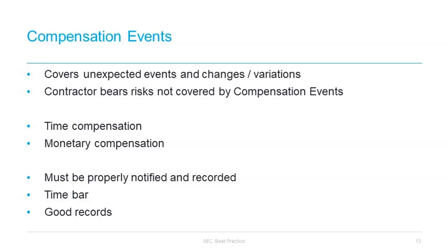Clause 65.1 intends that a compensation event is not implemented until a quotation is accepted or the project manager notifies his assessment. However, in practice, implementation often happens concurrently with or even before the assessment. In our experience, contrary to the position intended by the drafters, compensation events are frequently assessed on a retrospective basis because, for example, the contractor needs to progress the additional instructed work without delay rather than wait for the notification, quotation and assessment process to be implemented before doing so.